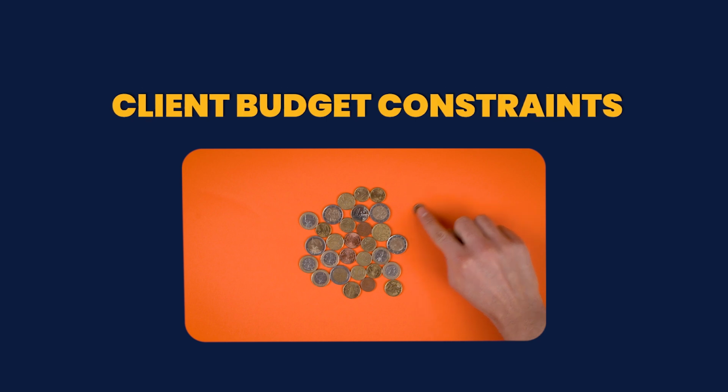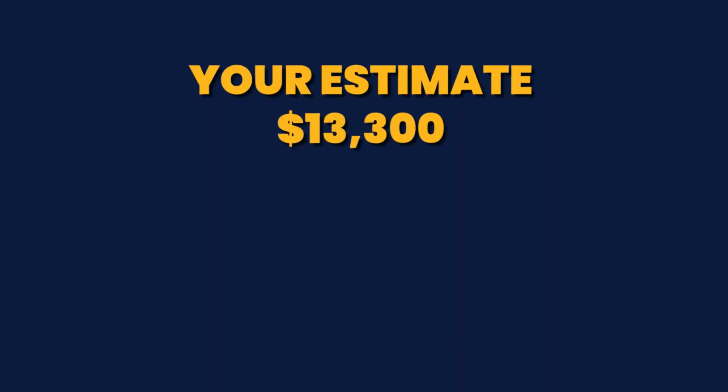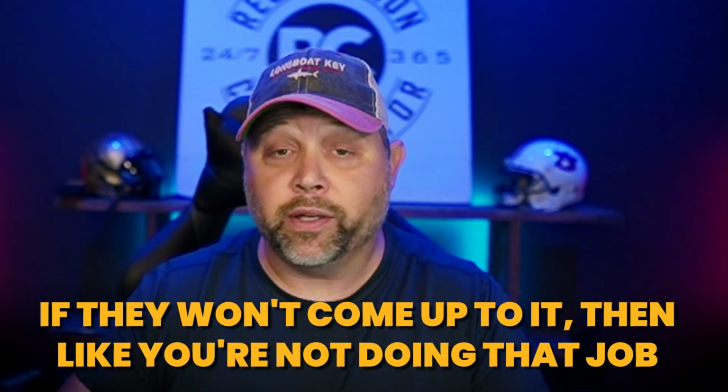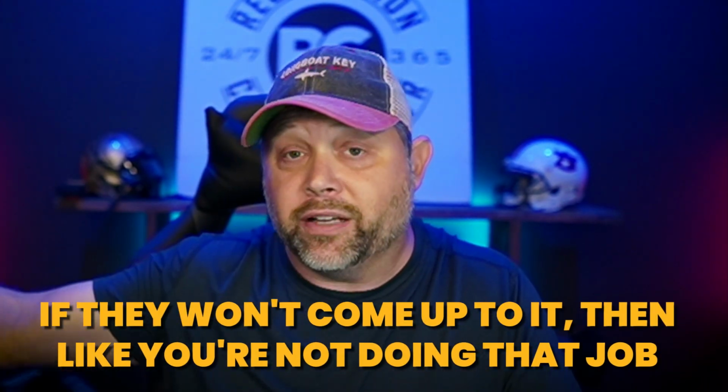Okay, so let's talk about another scenario in reconstruction. Shane, what do you do when you have budget constraints? Maybe your estimate for this project is $13,300 and the adjuster is at $10,000. What do you do? That's a great question. You tell the homeowner, you owe me $3,300, you want me to do this job. That's what you do, okay? Your number is your number, your price is your price. If they won't come up to it, then you're not doing that job.